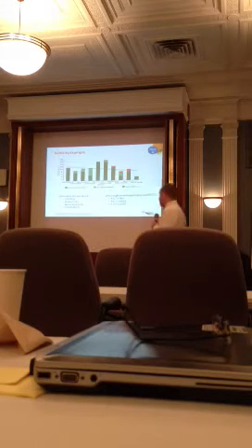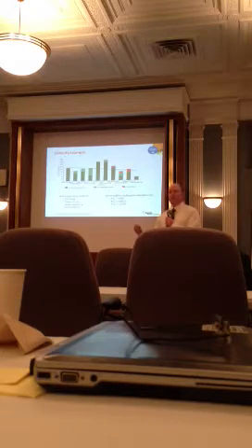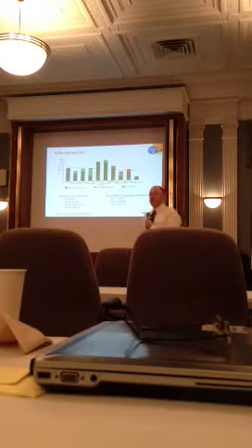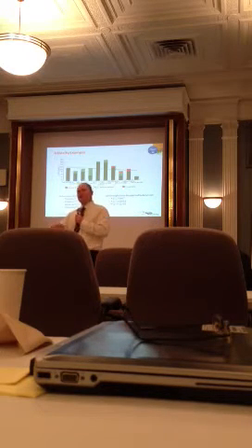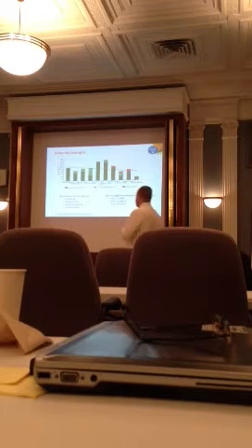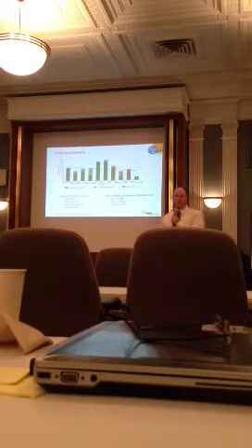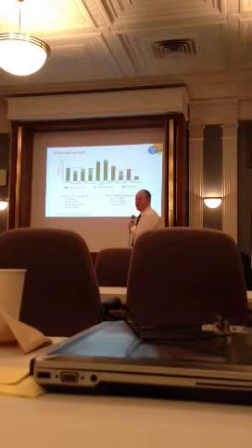Okay? So this dark green, I committed to it in the iteration of August 26th, and it got accepted before August 26th. The light green is I committed to it in that iteration, but I didn't get acceptance on it until after that iteration ended. So this light green here was accepted at some point over here. We don't necessarily know where by this graph, but it was accepted after September 9th.